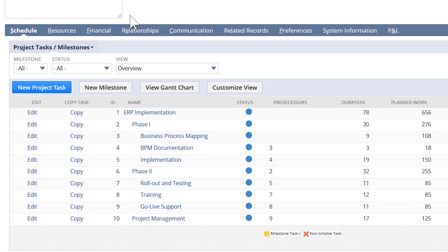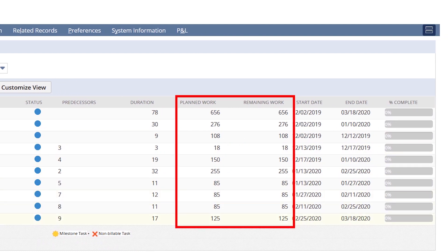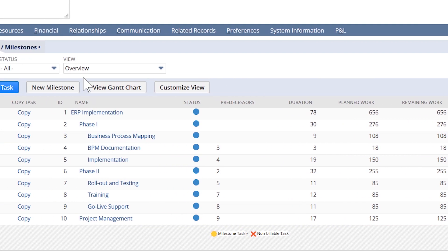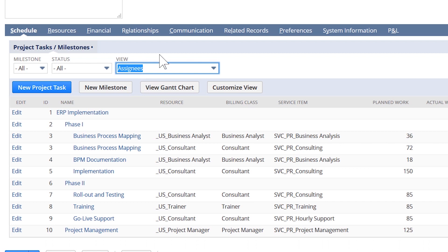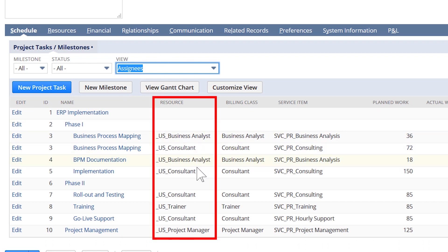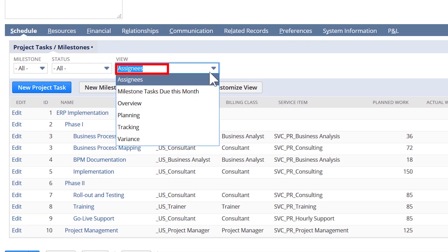All of my tasks are populated from the template to include the amount of planned work and remaining work, which will update as my resources start entering time against these tasks. To get a different look at these tasks, I change my view to Assignees, which is currently populated with generic resources. Generic resources have been included in my template and they act as placeholders that tell me what kind of resources we need for this project.